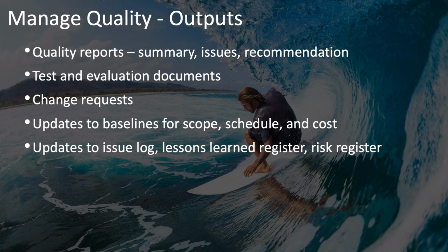The quality reports include a summary about the quality overall, identify issues, and provide recommendations for changes to processes, corrective and preventive actions, and so forth. The test and evaluation documents are used by the control quality process to do the measurements that are needed.